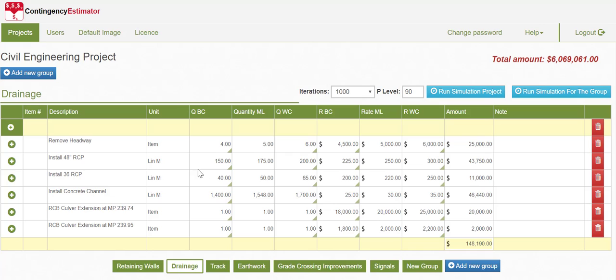Additionally, once the estimate's been approved, I can use this for forecasting project end costs because I can put in real data here in terms of the actual quantities used. They'd be the same value, and similarly I can use the same rate, and that will lock in that rate with no variability, so it won't affect contingency, but it will give us an input into the total bottom line. So that's probably as simple as is possible to run a Monte Carlo simulation for inherent risk.